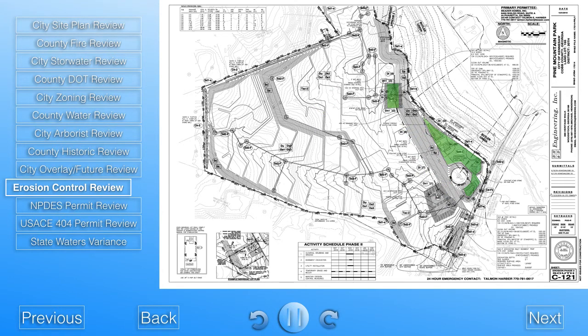During Phase 2, Sediment Trap 2 will move to a new location. This will accommodate the new drainage pattern. A temporary sediment pond will also be installed to drain approximately 9 acres. The sediment pond is an irregular shape with a length to width ratio exceeding 2 to 1, is 10 feet deep and has 3-to-1 side slopes. The total storage volume is 1,392 cubic yards.